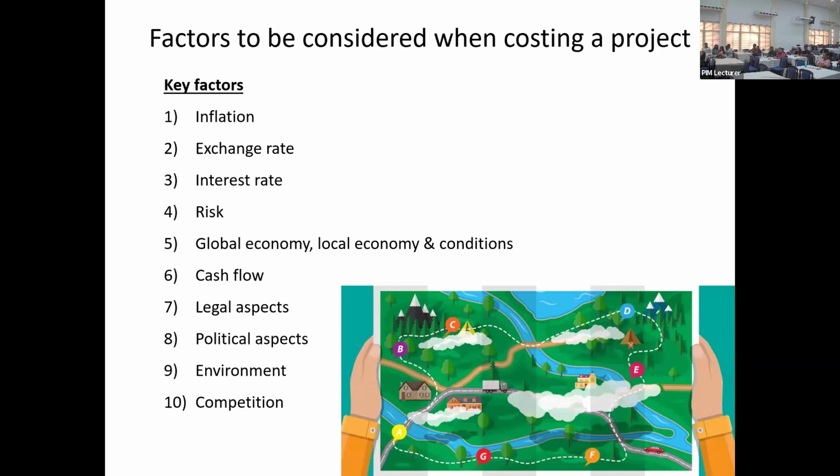Remember, when you are doing a budget, there is nothing called miscellaneous expenses. You can call it some expenses, that's all right, but it has to be an expense, not a miscellaneous, unknown expense. We can't have that. Same here, you can't have an unknown factor, but you can have a risk factor.